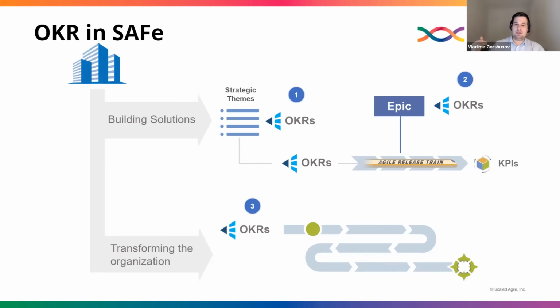And there are some mechanics on the essential level, on the Agile release train level, that are also really OKR-like. Like we have regular cadence of goal setting, quarter goal setting, or cycle goal setting, or program increment planning. And we have team goals for the program increment that in most cases equal the quarter, and we have a cadence of regular system demos of the cross-team collaboration to see where we are. So it's kind of natural already, even if the OKR language is not used on the team level and Agile release train level in Scaled Agile framework.